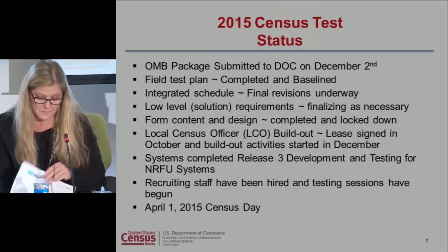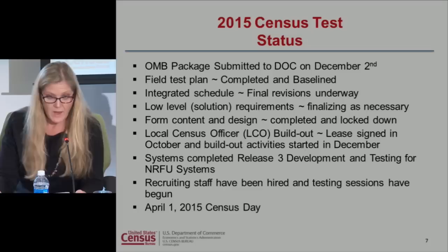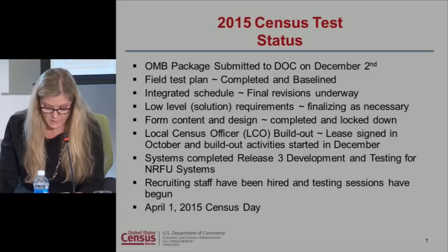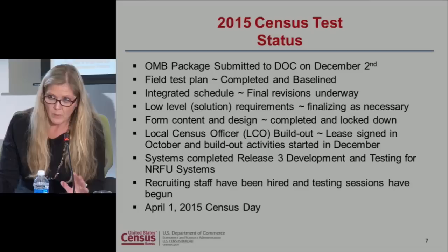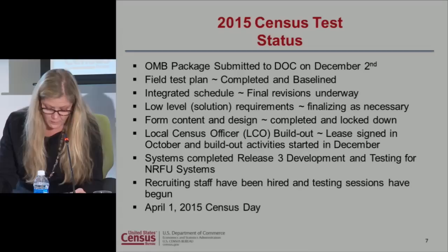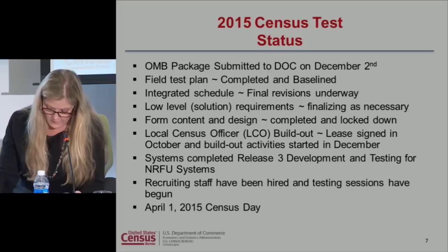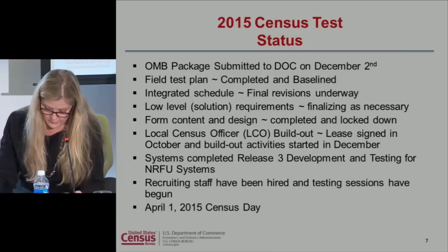The high level status update for this test is as follows. We submitted our OMB package to the Department of Commerce on the 2nd of December. Our field test is completed and baselined. Our integrated schedule, as Deirdre mentioned this morning, was baselined on December 31st, and we're making some final revisions to the schedules after we get through our on-site, off-site next week. Our low-level solution requirements we've been finalizing as necessary. Our form content and design is completed and locked down. For the local census office build-out, the lease was signed in October, and the build-out activities began in December. And our systems completed release 3 development and testing for the NRFU systems.